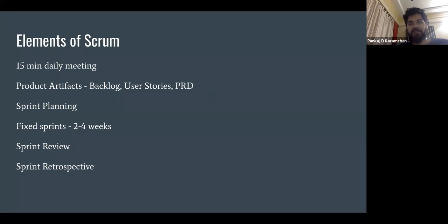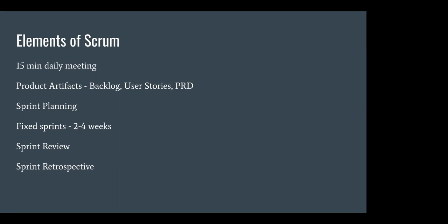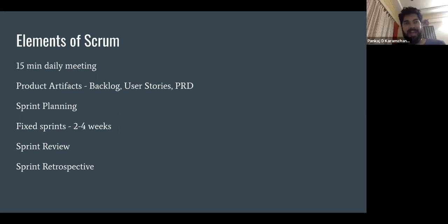In my experience, having worked with so many different product organizations, no one keeps bandwidth for unexpected things that have to be done. But on the fly, if we figure out that something needs to be done, then we deprioritize the item which was picked up in a sprint, and we pick that up in the next sprint. Understood. But one good approach for tackling things like tech debt, bugs and issues is to keep 30% of your bandwidth only for that.